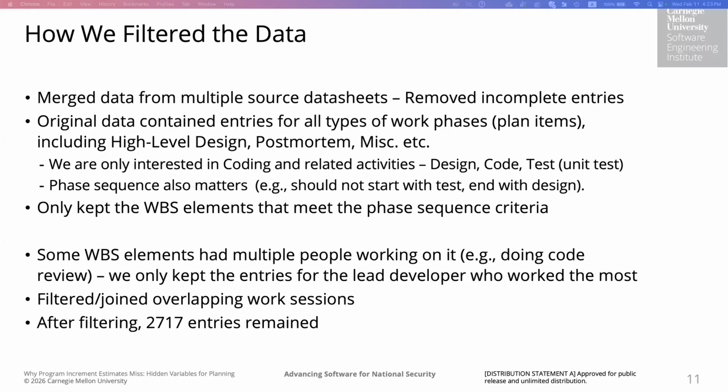The next step was addressing the multi-person work items, because some WBS elements involve multiple contributors, for example, during code review. To reduce the attribution ambiguity, we retained only the entries for the lead developer, which is defined as the individual who contributed the largest share of work time for that WBS element.